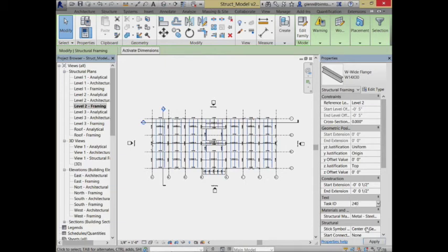So I hope what you're seeing here is that my ability to select things, filter, and grab just what I want in Revit is actually pretty good. I'm very fast over there. And if I go through and associate these things over in Revit, then as the designer, I could start associating things with the construction activity and have a little control as I go through and plan the entire process. So if you can handle the notion that you can assign these things over in Revit, just add one project parameter for task ID, and assign them over in Revit.